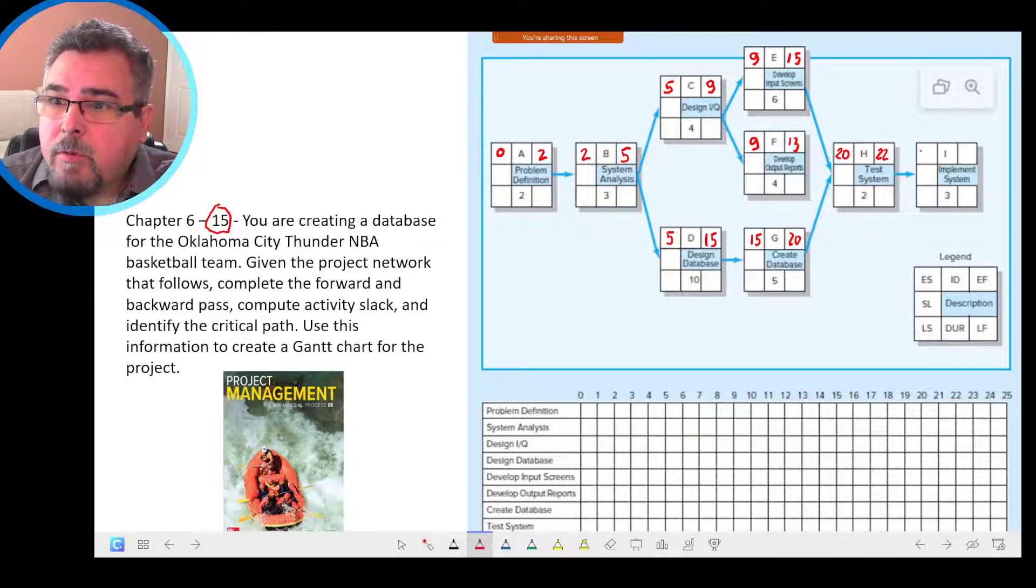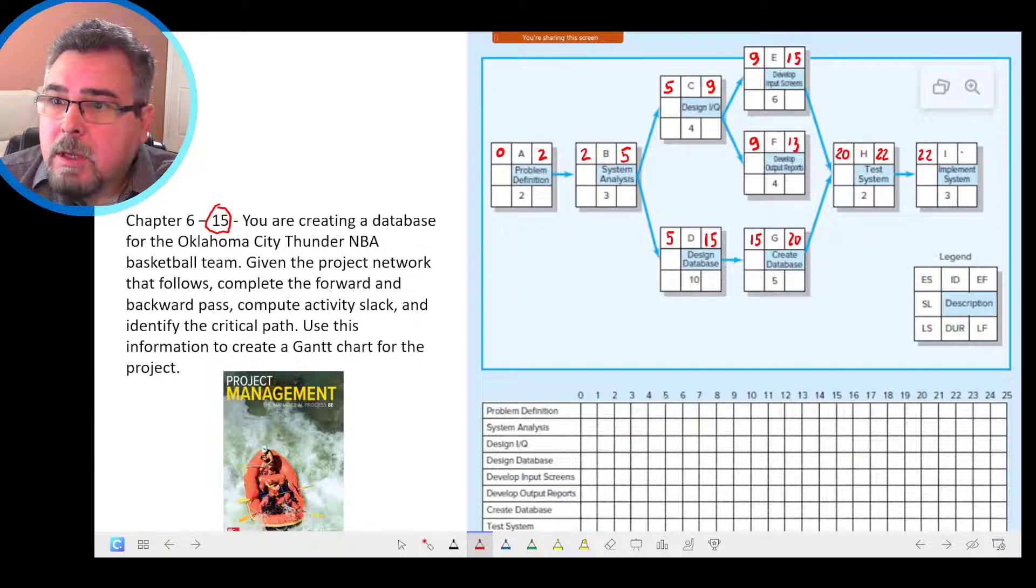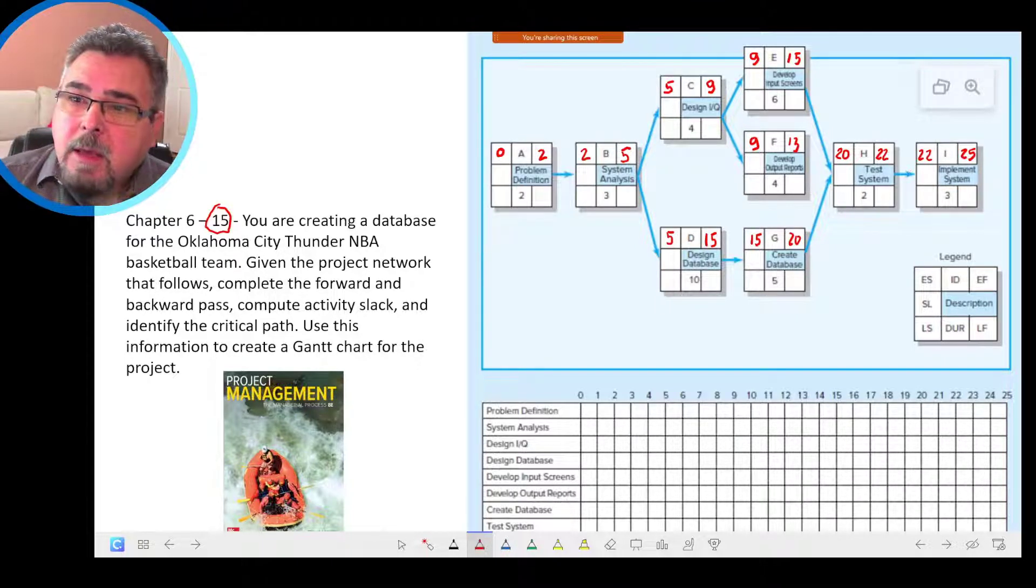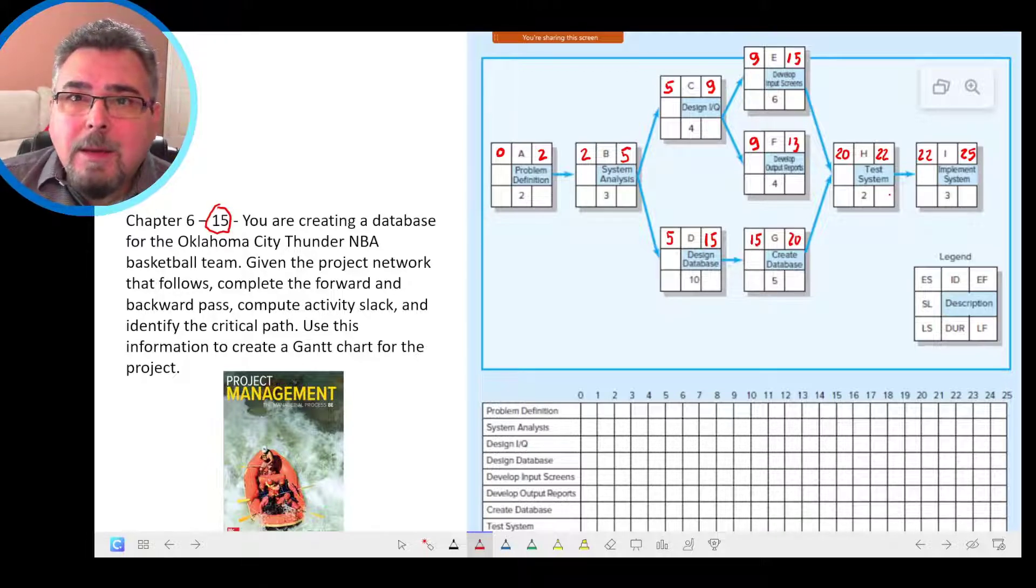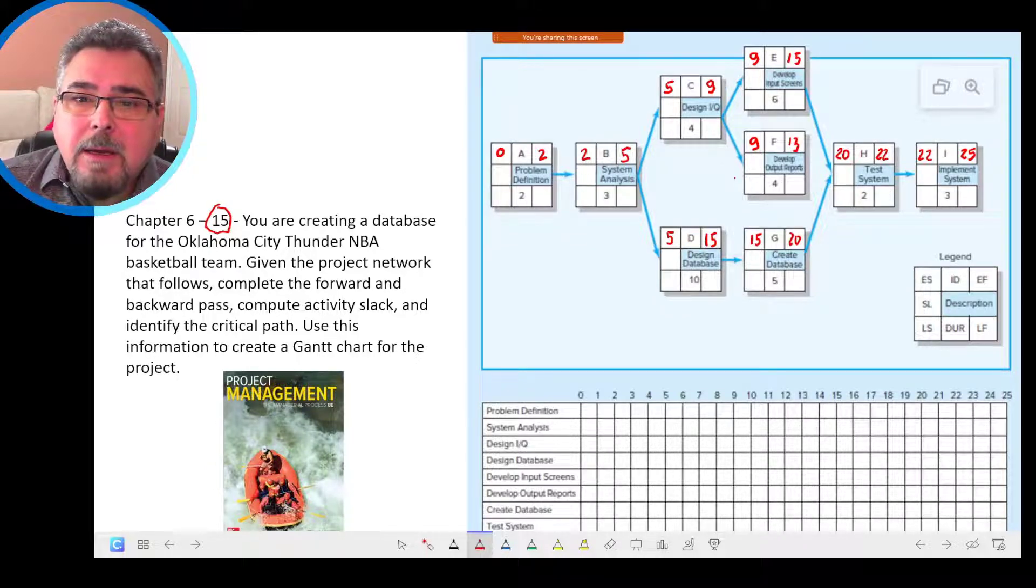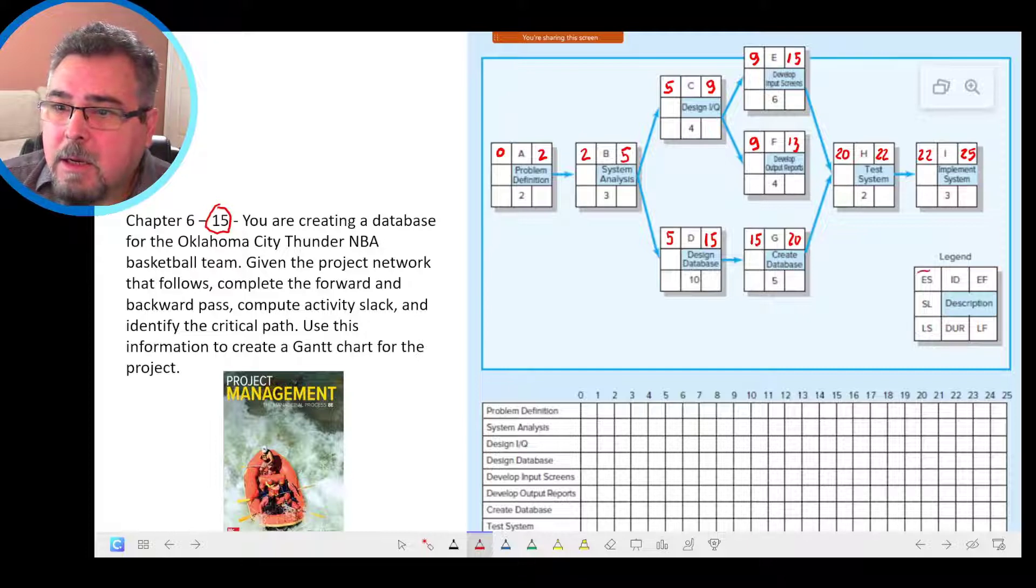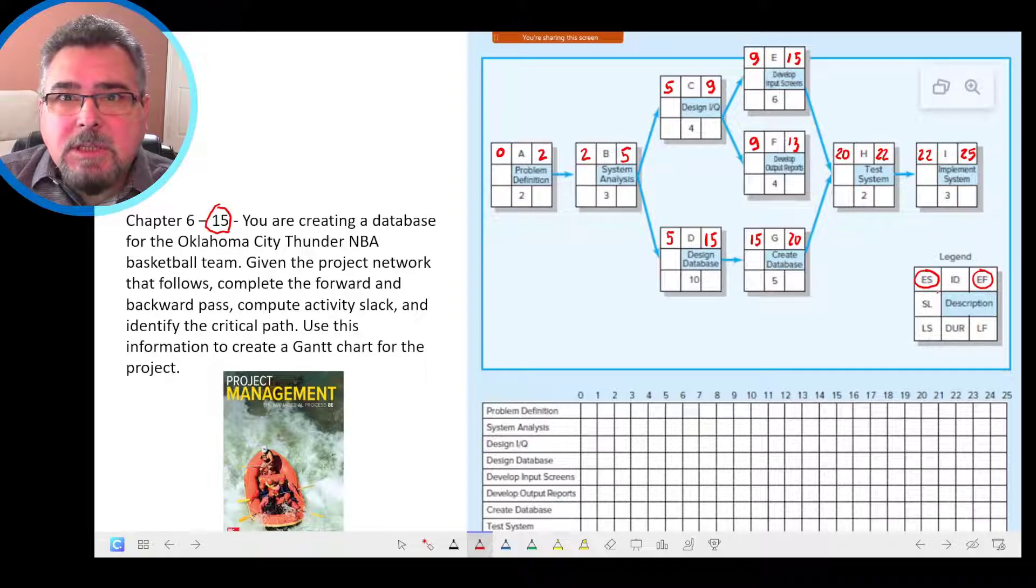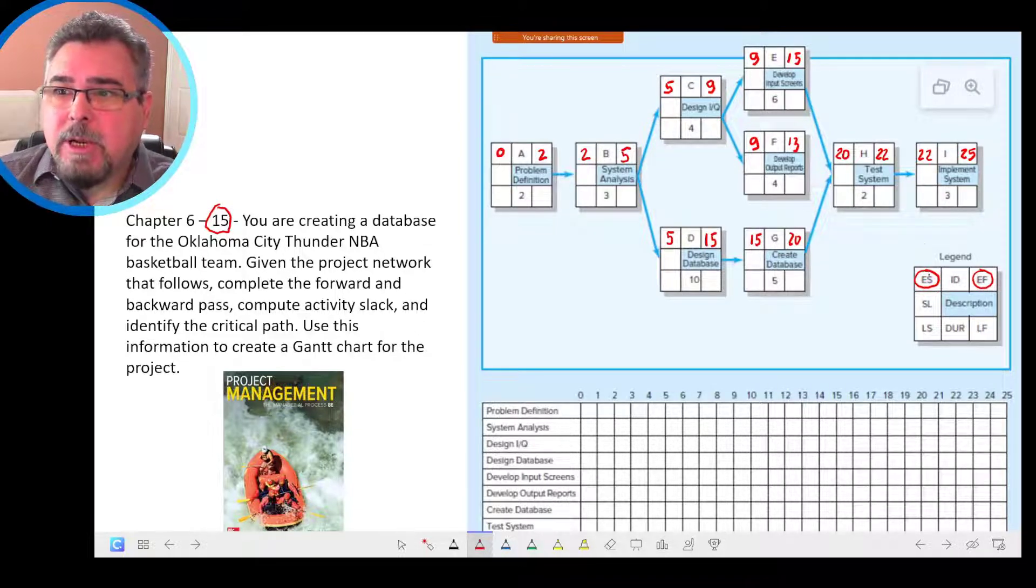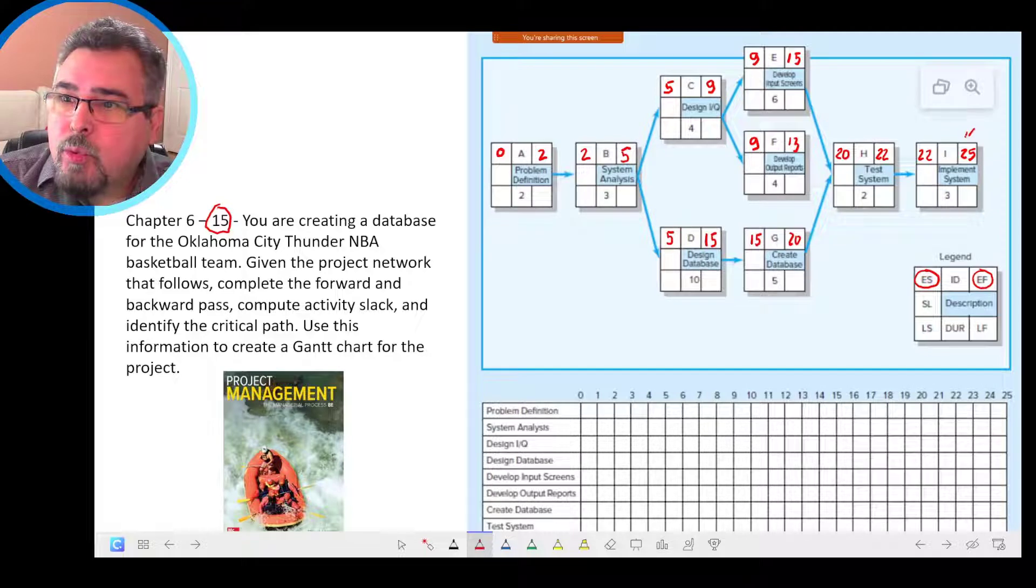And then we move forward 22 and here, with 25. So that's the forward path. As we can see the forward path, we determine the early start and early finish for each activity, and the project duration. The project duration is 25 days.